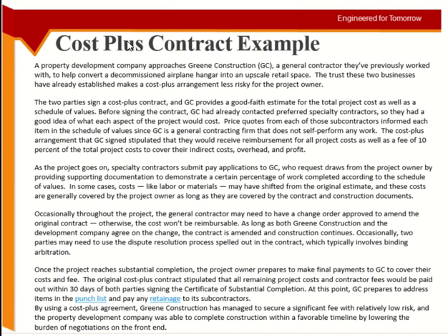The main contractor is hiring someone on lump sum basis because he wants to know the total cost. Obviously, he is on cost plus basis, and if he hires someone else on cost plus basis, you are increasing the risk. Anything can happen on any level. Normally, the lower subcontractors are on simpler basis. They have simpler agreements, total cost or something. So for those subcontractors, they are keeping a retainage as well.